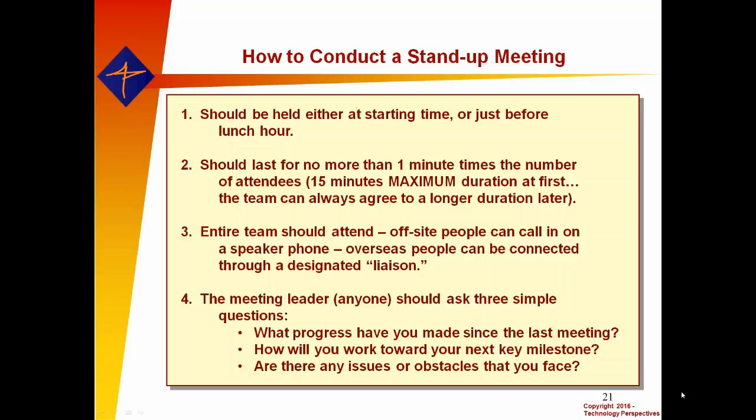That's question number 1. Number 2 follows directly from that. What are your plans going forward? What are the next things you'll be doing? What are your priorities moving forward? The most important question is the last one. What issues or problems are you facing that could cause you to delay?